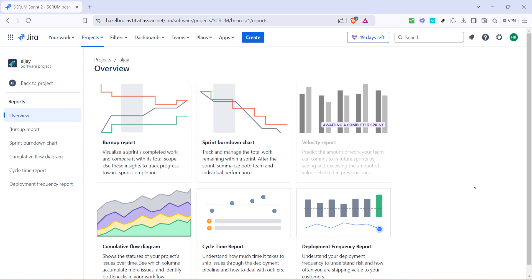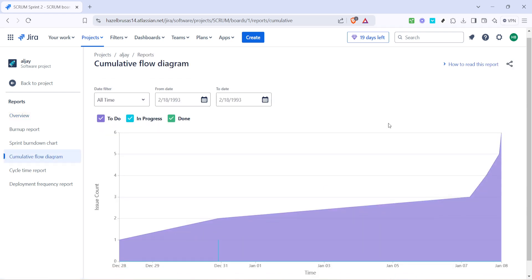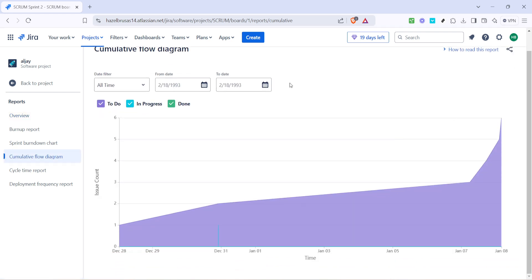To demonstrate a particularly insightful option, let's look at the cumulative flow diagram. Click on the cumulative flow diagram from the reports menu. This type of report is particularly beneficial for visualizing the progress of tasks over time. It allows you to see the work items as they move through different stages of completion, giving you a clear view of bottlenecks and work distribution.